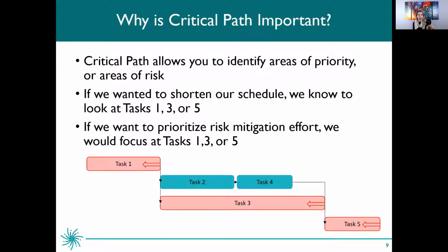However, task 5 cannot begin until task 3 and task 4 are both completed. Well, task 4 is going to finish well before task 3 if we're looking at this moving over time. We need to know that each day task 3 delays is going to delay the start of task 5 day for day. That's the same for task 1 as well.